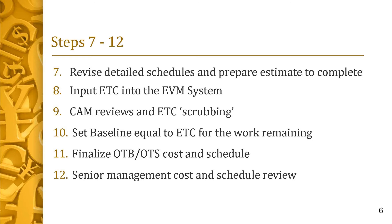The last step, number 12, is the senior management review and approval by both the contractor and DOE. This is also the opportunity for the parties to affirm their commitment to complete the effort within the cost and schedule plan. At this point, the parties determine the timing for conducting the integrated baseline review. In summary, this process ensures that the PMB is equal to the latest forecast of completion, so it is reasonable for assessment of performance.